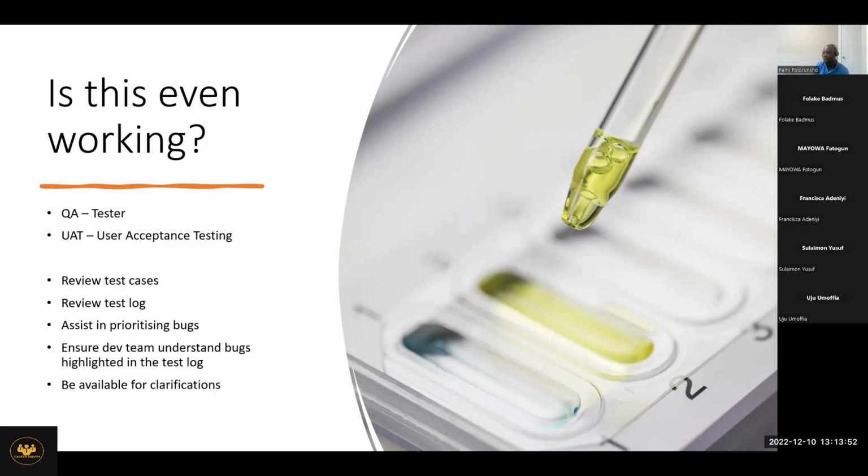So they are not bugs. That is the reason why you have to review the test cases, so that you can make sure they're mirroring the requirement and nothing outside of the requirement is being tested. Because if that doesn't happen, it's a real time waster, right?